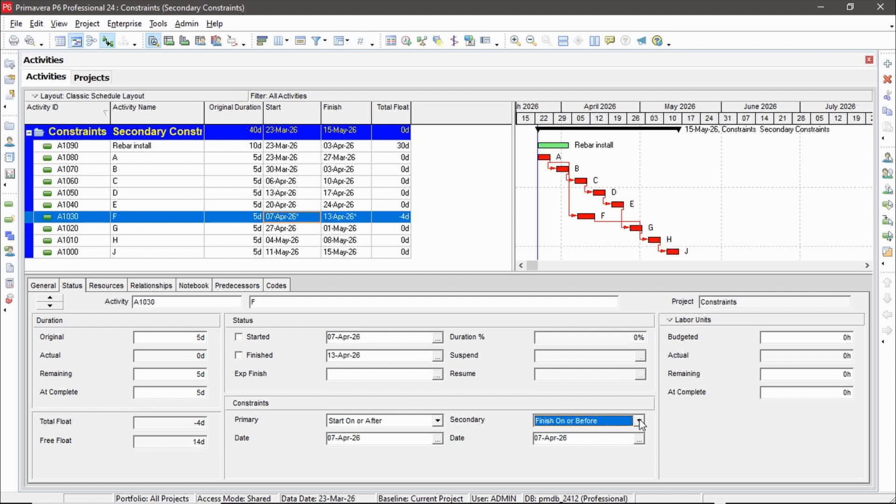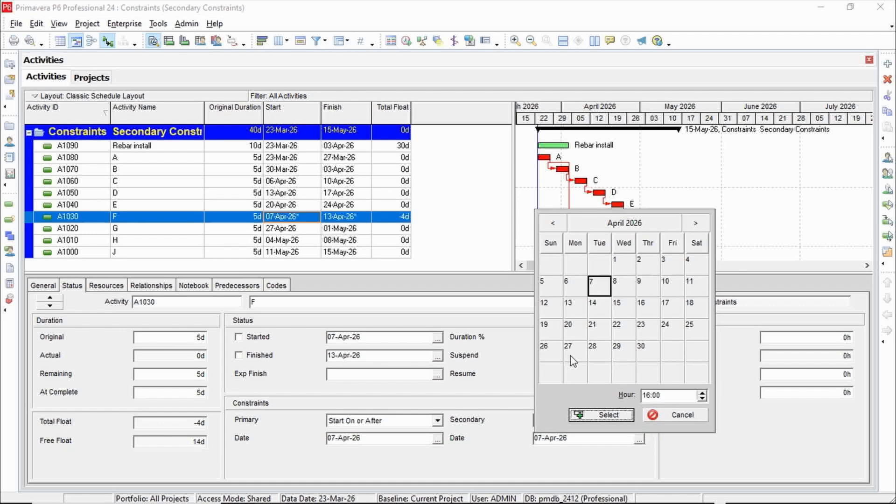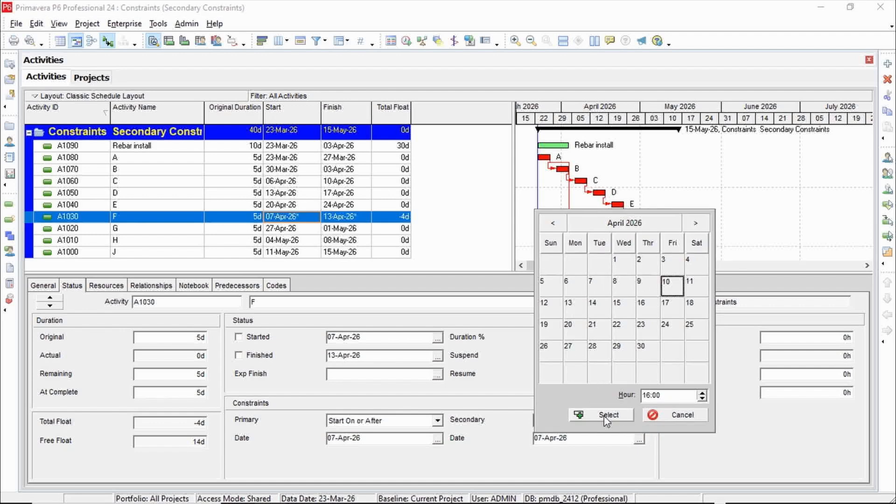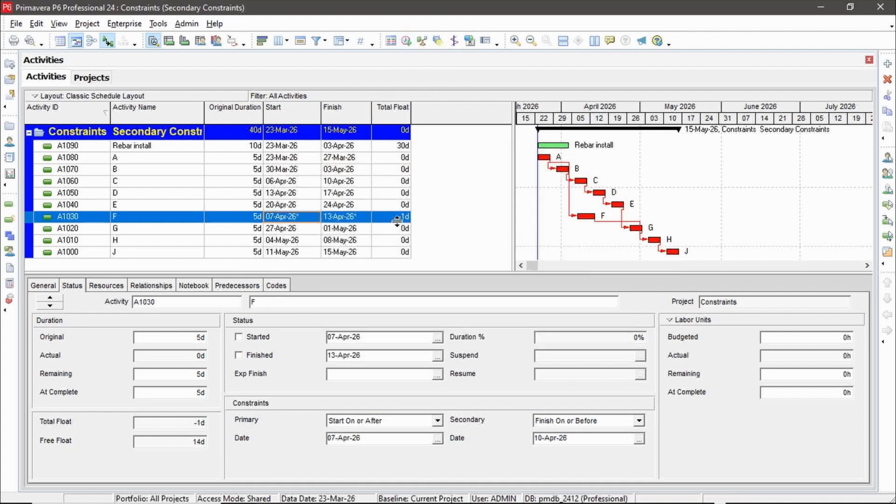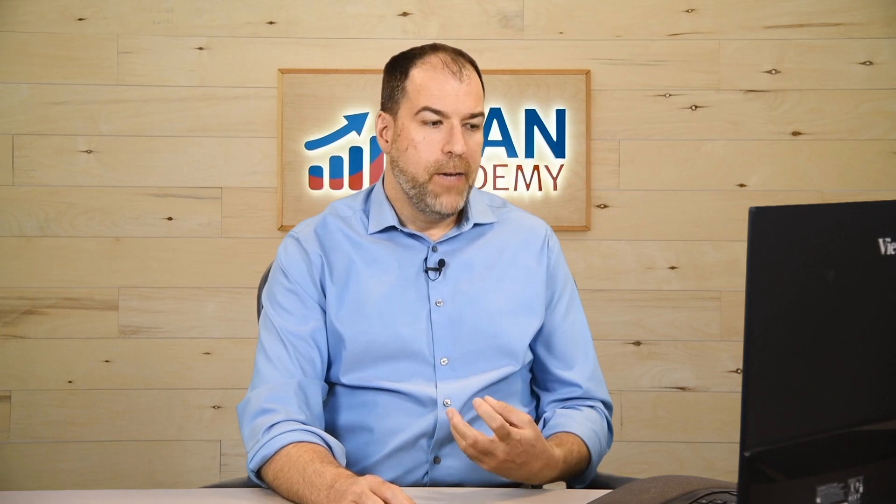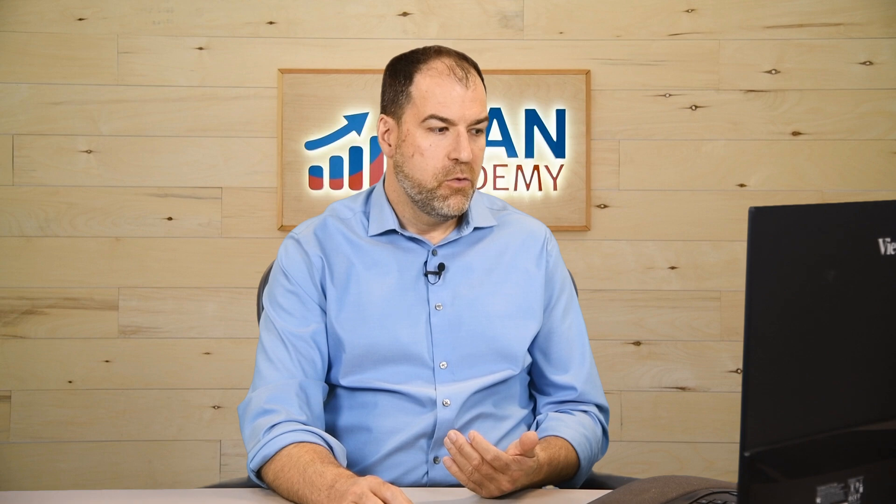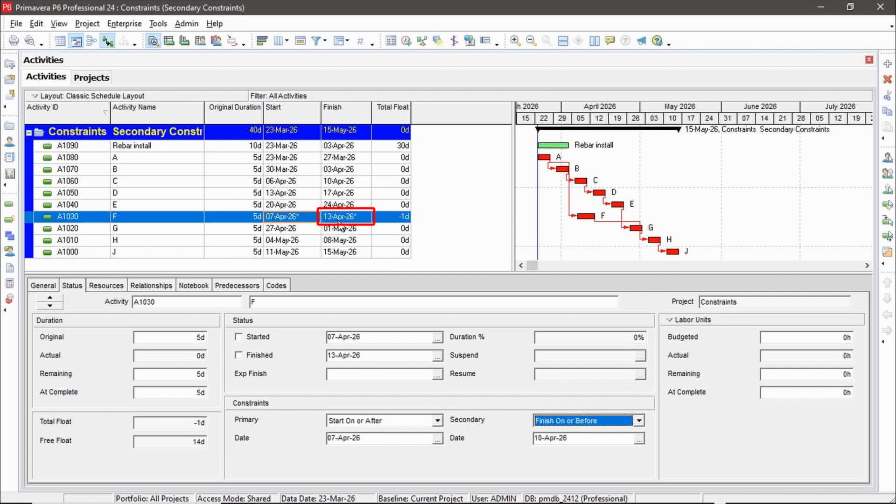So maybe let's try something here for fun. What if I finish on or before a date earlier than the 13th? Let's say the 10th. Once again, I have some negative float. Okay, so I did this on purpose. I wanted to see the effect of breaking one of these constraints. I am starting on April 7th, but I'm not finishing on or before the 10th. I'm finishing on the 13th. So I've broken this constraint and I have negative float to show for it.